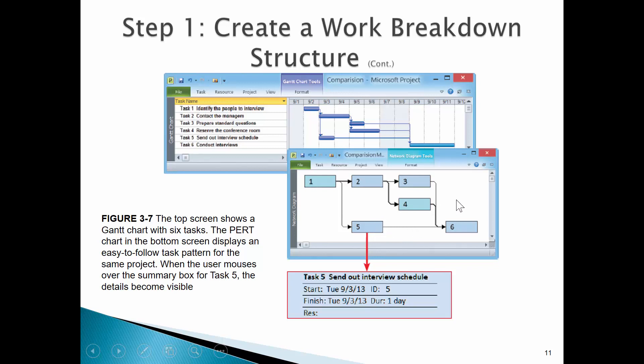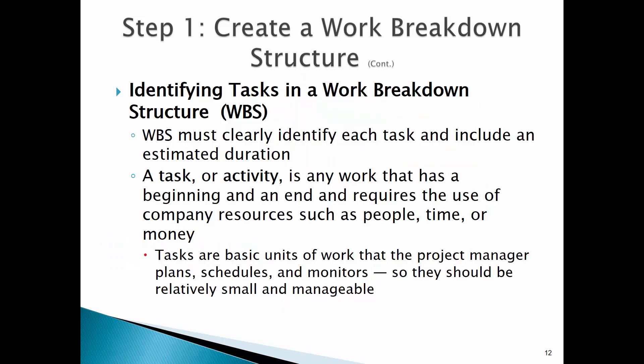Here's a little example of a work breakdown structure. Here is a Gantt chart. This would be more of a PERT CPM. Each of these boxes would have some data in it. We give it a task ID, a start date and the finish date. A lot of times we do these in what's called work days. As we talk about duration, one day we're talking about eight hours.